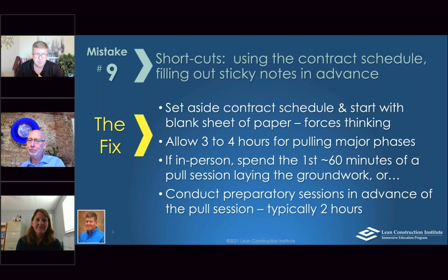Sometimes I've seen groups just throw up the contract schedule on a screen and say, okay, does everybody agree to this? And everybody kind of nods, and then they're like, okay, we're done. We did our pull plan. And that is not pull planning, I'll tell you that.